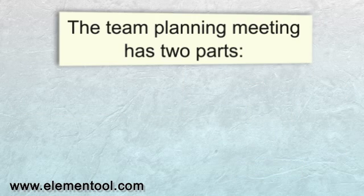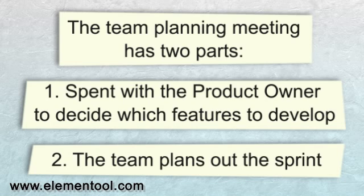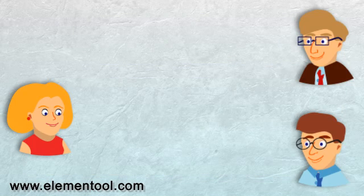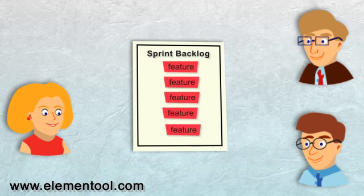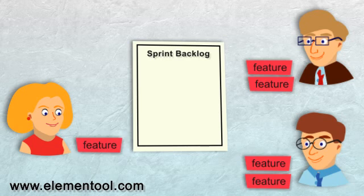The Sprint Planning Meeting has two parts. The first part is spent with the Product Owner to decide which features to develop. In the second part of the meeting, the team plans out the sprint. The selected tasks are placed in the sprint backlog and assigned to the team members.